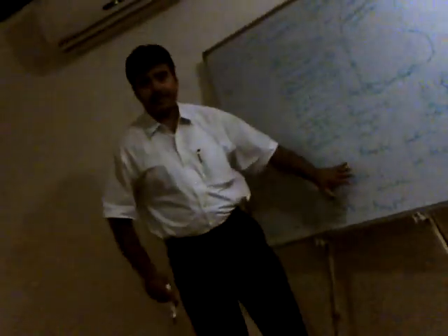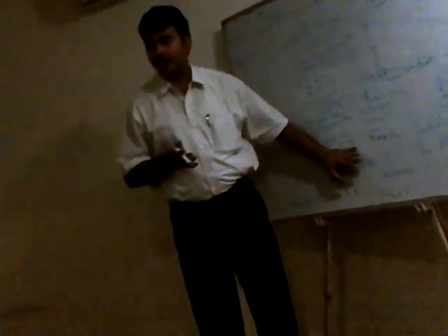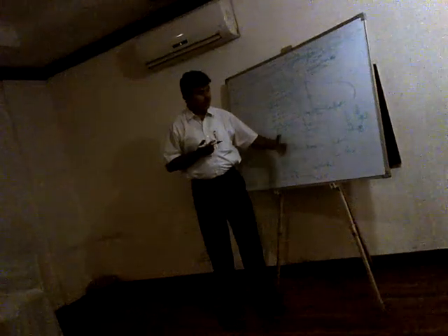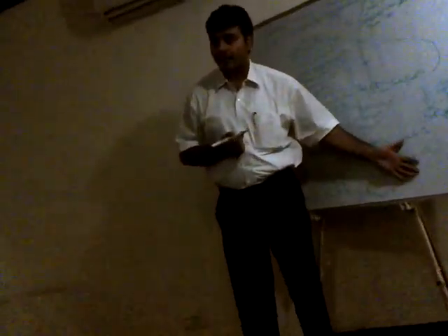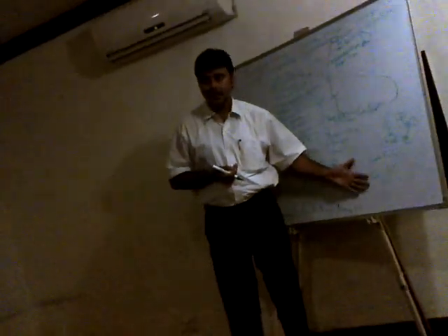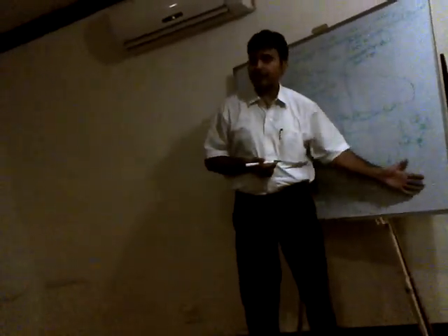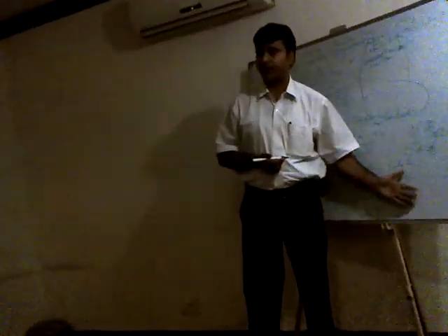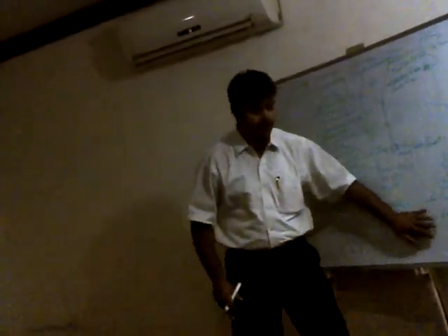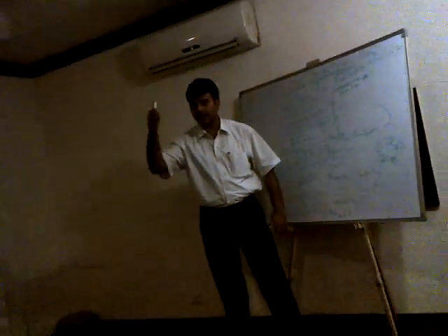Now, what happens is that after you've planned as to how you're going to address the risk elements, you need to periodically assess whether the risk elements is still there in the same intensity or less. So that is what we need to do when we do control risk. We have to do reassessments. We need to find out whether the risks are there in the same intensity or not. Clear? So that is what we do in control risk. Again, the same thumb rule. Clear?